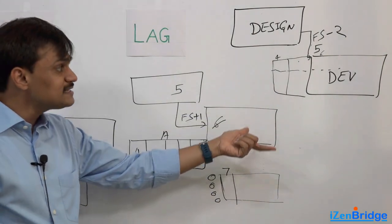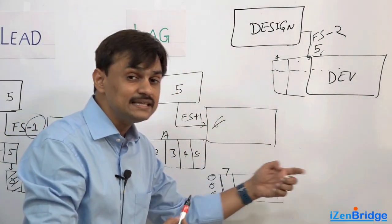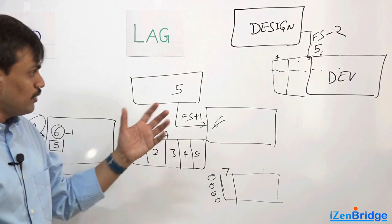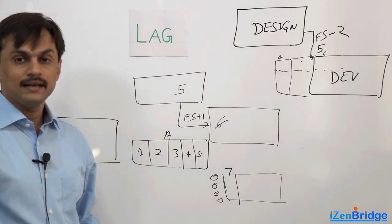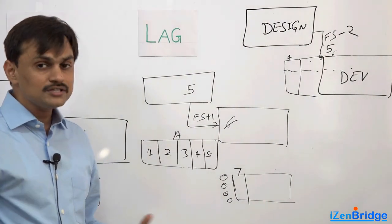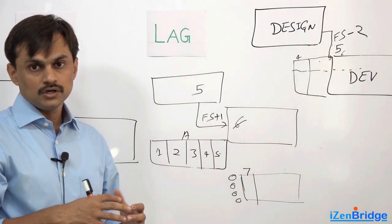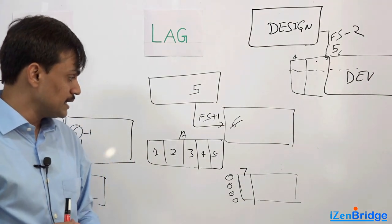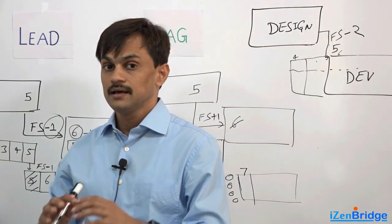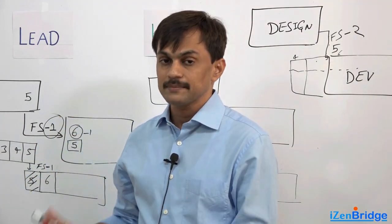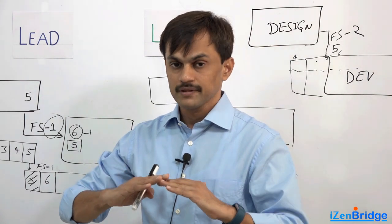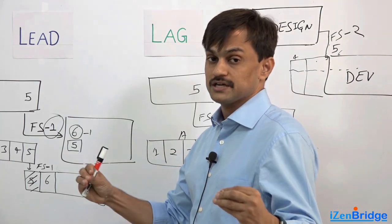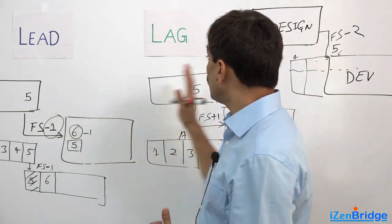So in some cases you put this leading thing when the relationships are not hard logics. There are some level of parallel things that can happen. When you have to forcefully wait for something, you apply lags. Some project managers also put lags just to give some breathing space between two activities. But it is not slack. Slack is a different concept. This is primarily coming based on relationship identification. So we will discuss lag separately, but this is just coming based on relation between two activities. It can be either led or lagged.